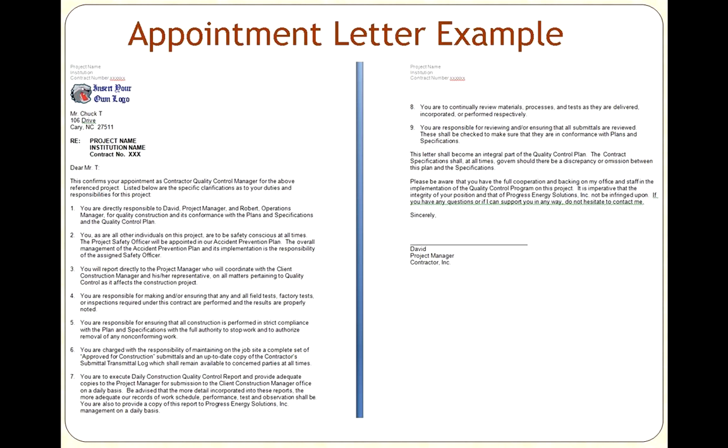So if somebody like that subcontractor said, you can't stop me, he could actually flash this letter and say, yes, I can. I had the legal right to stop you right here and now. I can't tell you anything different except stop. But I can tell you with this letter I'm holding in my hand, signed by my business officer or whoever the case is, I have the legal right to stop you, because this is what you agreed to in the contract. So essentially we would say, you need to be safe. You need to make sure that any tests that need to be done are performed, and if they say, we did it, you can say, I want the documentation. So we basically gave him teeth in order to work with a lot of these contractors.